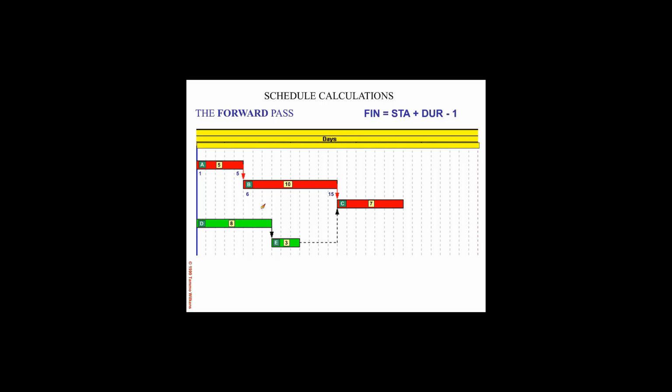So now you may be tempted to say that activity C can start on day 16. However, activity C has 2 predecessors. And again, while we see graphically that C is kept from sliding further left by activity B, the computer doesn't know that yet. It needs to evaluate all the dates for all of its predecessor paths. So we need to calculate the green path.